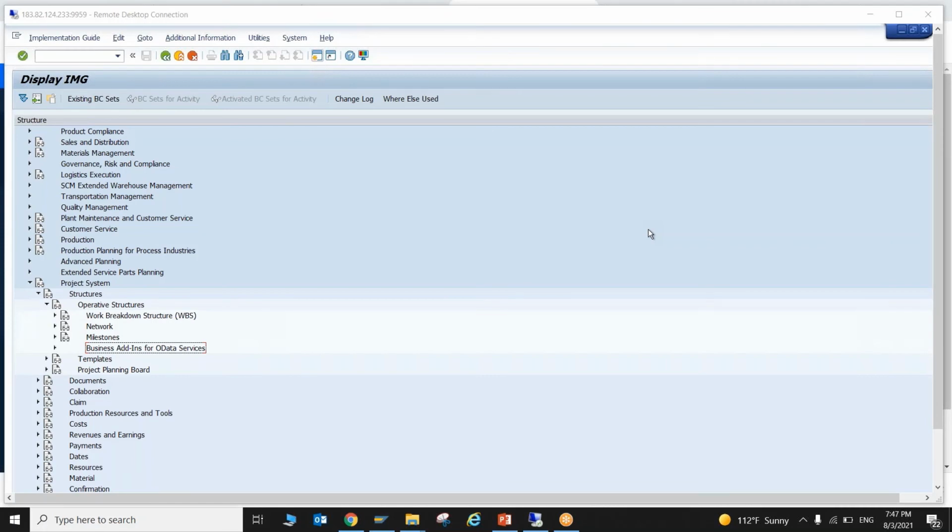Okay, and you define the usage here in the PS. You create a milestone billing, select the relevant to sales document checkbox, and you assign this activity along with your milestone to your sales item number. Okay, and on the billing plan tab, once you are confirming the activity, it will lift or remove the billing block. So this is the entire process explanation.